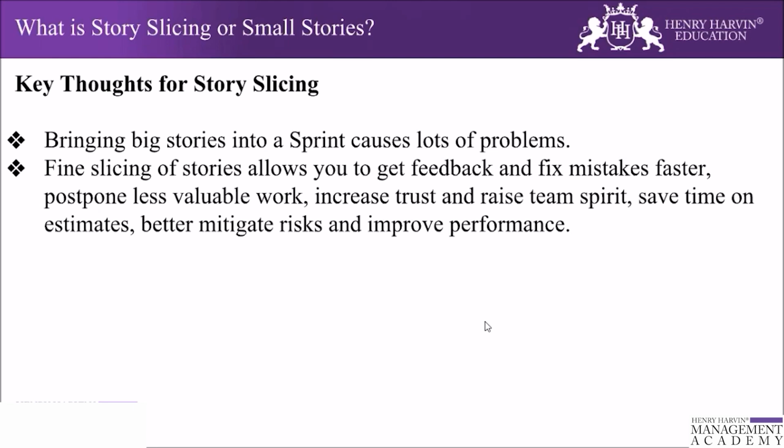So if the story is big and the PO wants to discard the story within the sprint, and the story spans multiple iterations, there is a lot of capacity that will get wasted, based on how much of the story has been done and how much has been left. For the same reason, small stories also provide more feedback opportunity, because they give us a possibility to get feedback on the stories.